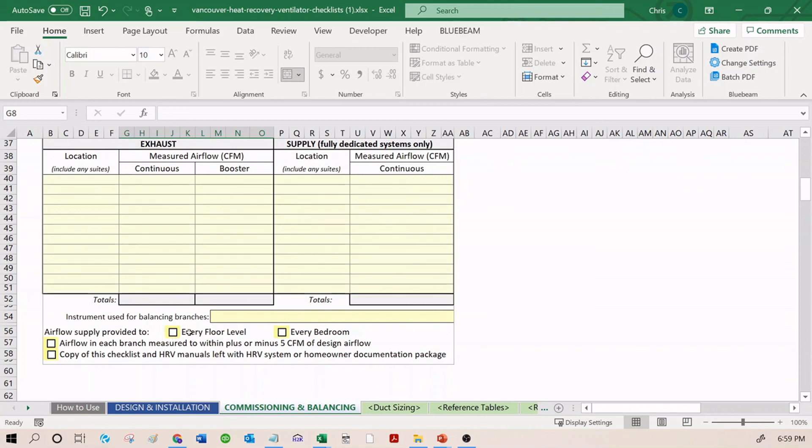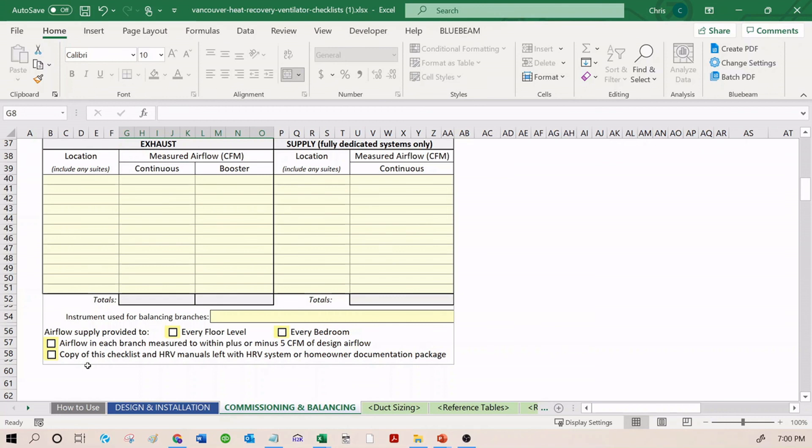Airflow supply provided to every floor, every bedroom. Airflow in each branch measured to within plus or minus 5 CFM of design airflow. Copy of this checklist and HRV manual is left with the HRV system or homeowner documentation package. Once this has been filled out, you should print it off as a PDF or a hard copy and again submit it to the building inspector at final.